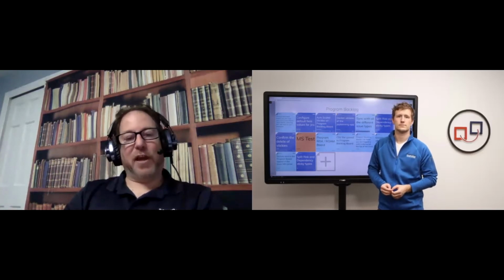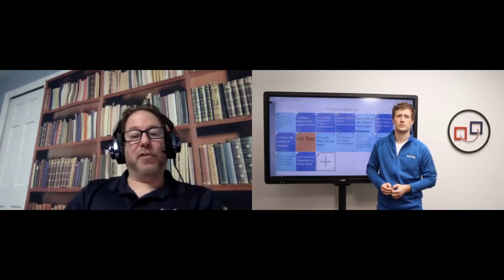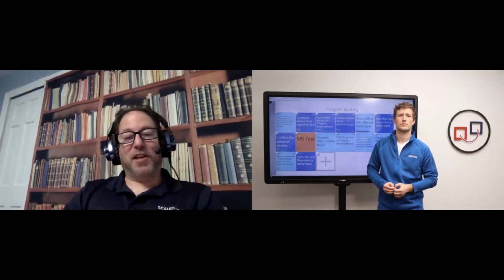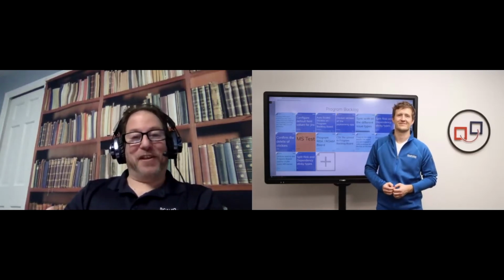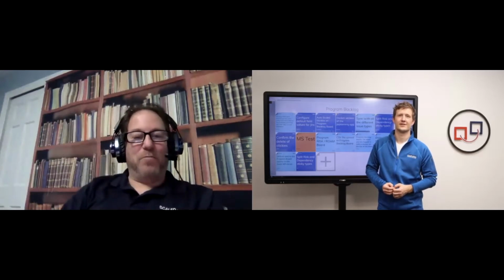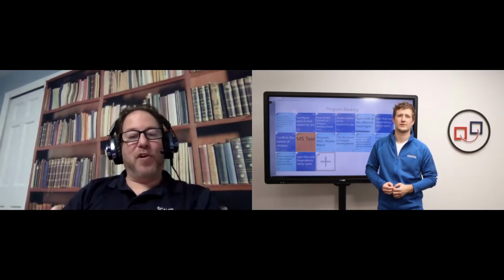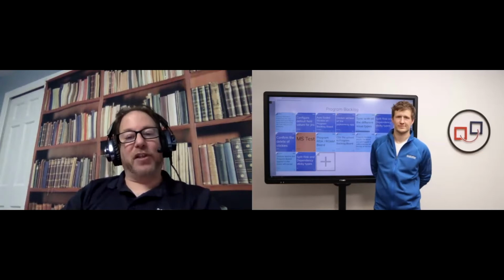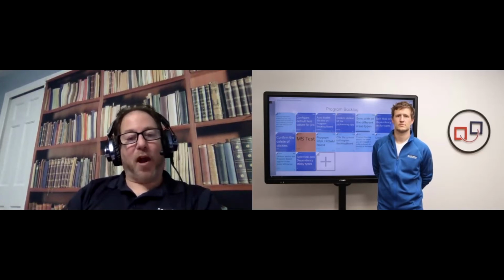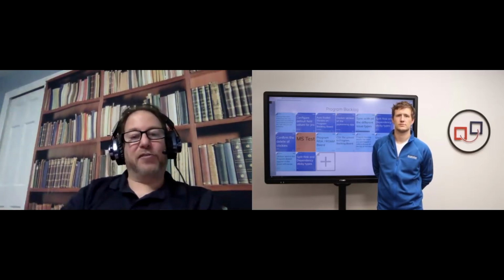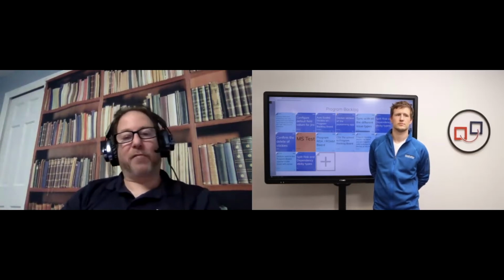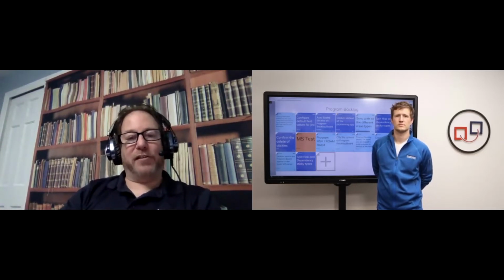Yeah, that's really great advice. And also with the video communications, it was our first time that we had 150 people on Zoom. We weren't sure if Zoom or Google Meet would be able to handle that many people. Would there be a lot of delays? Also, people's home laptops, their home internet connections. By doing that dry run, you can identify whether or not there are problems with people's connections, and maybe they need to upgrade their connection or have the internet provider fix something. So you can't underestimate the need to even just test that.